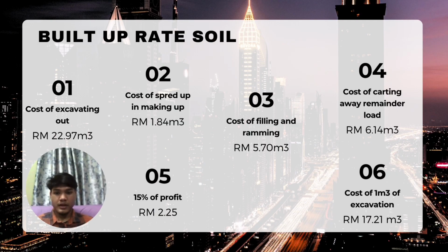Hello, my name is Muhammad Karami. Okay, I will explain to you about the build-up rate of soil. First, the cost of excavating the soil is 22.97 ringgit Malaysian per cubic meter. Next is the cost of spreading out and making up level, which is 1 ringgit 0.184 per cubic meter.